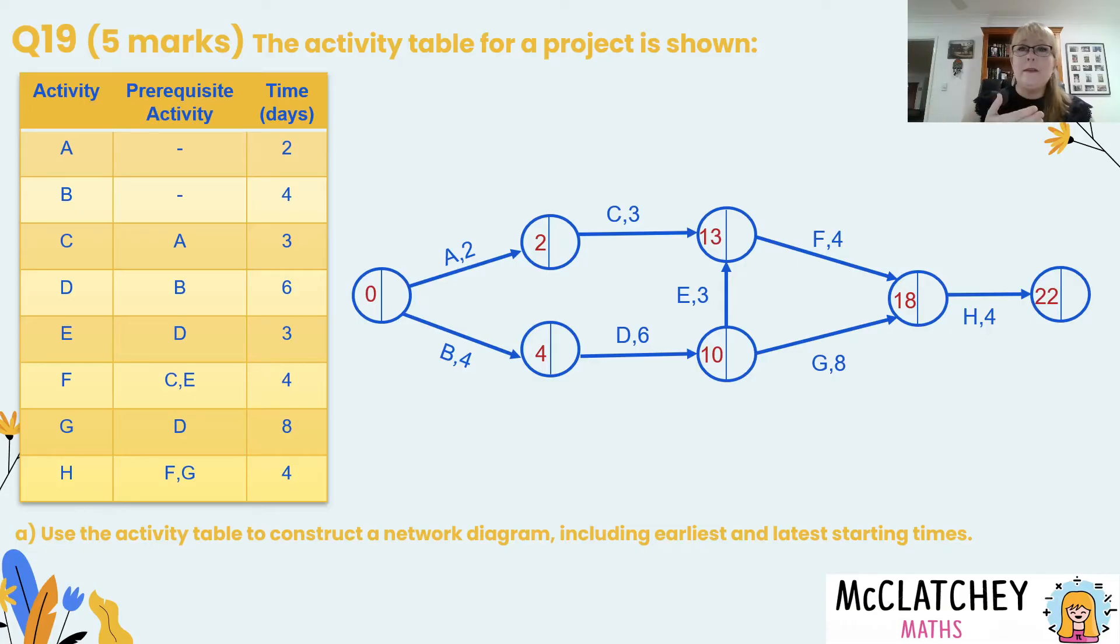Now we need to backward scan through the network. So the last vertex has the same number in it twice and now we simply move backwards. Well the first one is pretty straightforward. We take 4 away from 22 we get 18. Now we need to go through different pathways in the network.